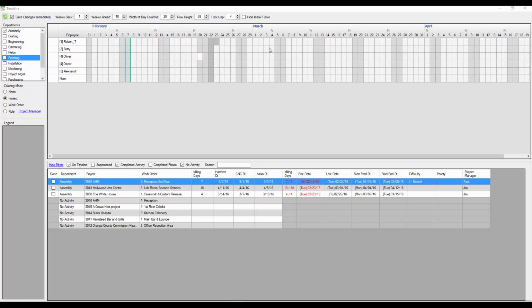In addition to the weekends that can be predetermined in the setup of Crow's Nest, you can also add special days. For example, if the company was to be closed on February 22nd, that could be provided company-wide for everybody, and even on an individual basis, Robert T. will be given the day off on the 23rd and unavailable for scheduling as a resource. One more thing to be considered is even on days off, employees can be given a special day on, as can be seen here where it is opened up for Oliver on Saturday the 20th.